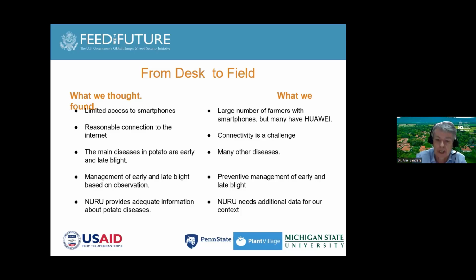It was necessary to set up some field experiments to understand better the management of early and late blight in Honduras. And it was also required to nurture Nuru with additional photos to detect early and late blight in the case of Honduras, and to get more information about the use of pesticides. In a certain way, our project approach is similar, but we added additional work, the field experiments, implying a shift in our costs. A large part of our original budget was assigned to buy cell phones, which was not necessary. And at this moment, we are adjusting the budget so that Penn State can approve our new approach.